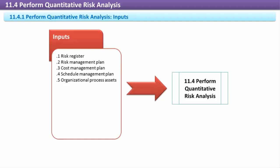Cost Management Plan. The cost management plan is a part of the project management plan, and it establishes how project costs will be planned for, estimated, organized, reported on, forecasted, and managed. The plan approach to cost management may increase or decrease project risk factors.